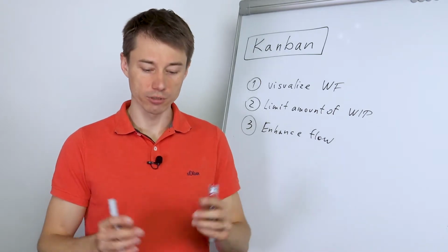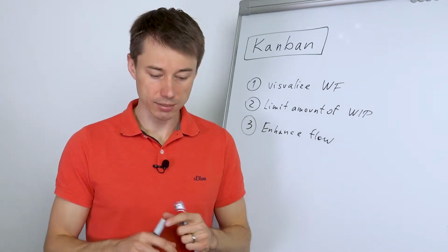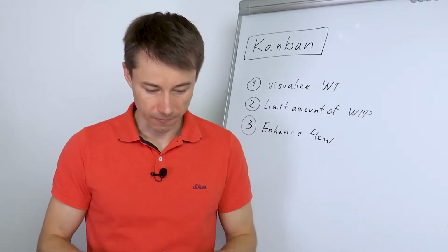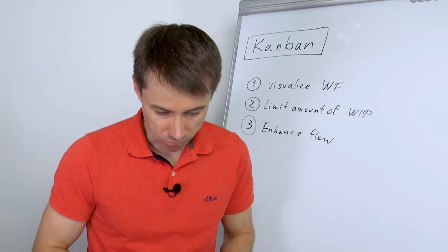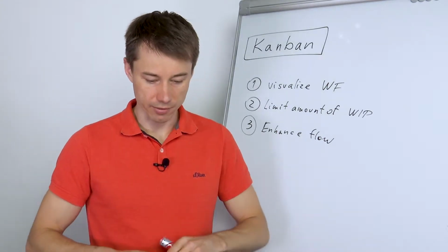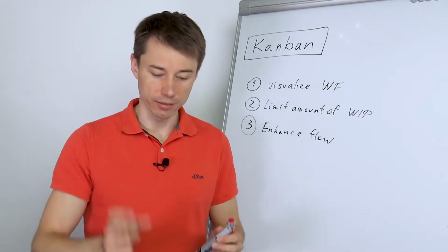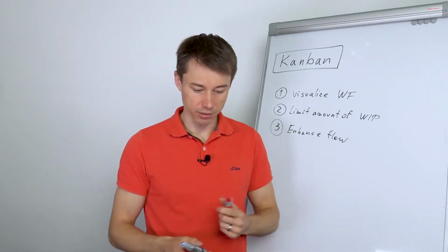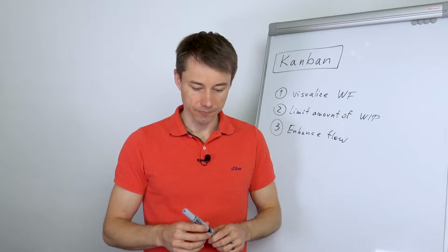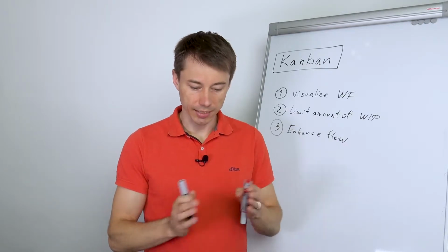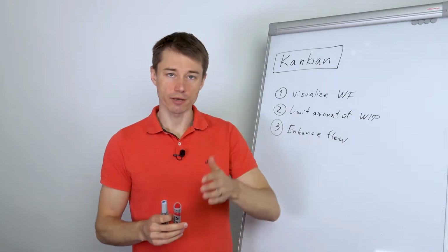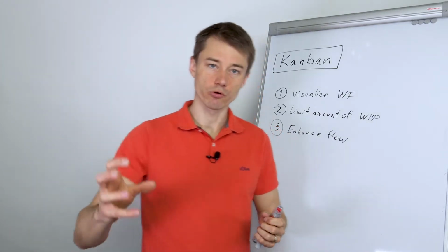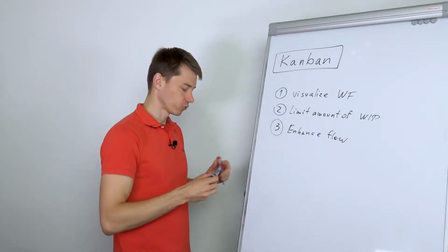This is a board where you can see individual tasks, right? So for example, on the left side, you can see account for Animator Modulator, or whatever that means, but this is one task. It has one person assigned. You can see the priority. You can see that it is selected for development because it is in the column, right? And as the tasks progress, they shift from one column to another.